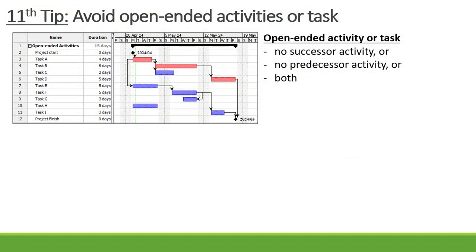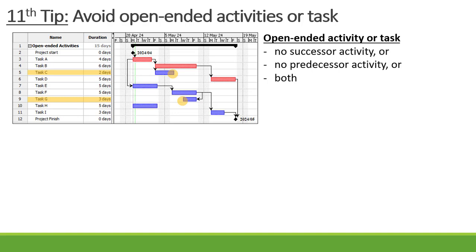The 11th tip is that you need to avoid open-ended activities in a project schedule. What is an open-ended activity? First of all, it can be an activity with no successor activity, like Task C. Task C doesn't have a successor activity. Or it can be an activity with no predecessor activity, like Task G.